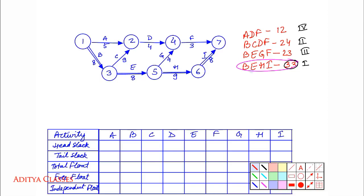Let us start with our forward pass and backward pass of the first path. We will make it a quick one this time. BEHI: If I start at 0, 0 plus 8 gives me 8. 8 plus 8 gives 16. 16 plus 9 gives 25, and 25 plus 8 gives 33. This is my forward pass. Then the backward pass: 33 minus 8 is 25. To finish H by 25, I have to start H by 16. To finish E by 16, start by 8. And B by 0. So this was forward and backward pass on our critical path BEHI.